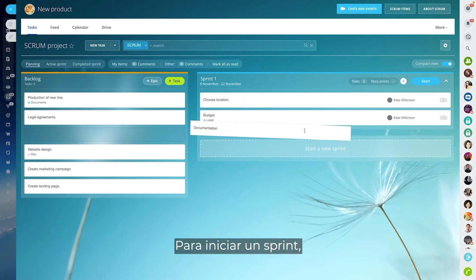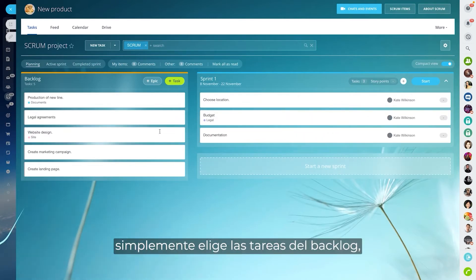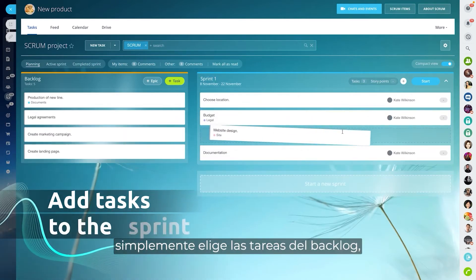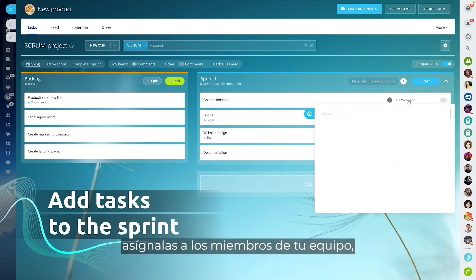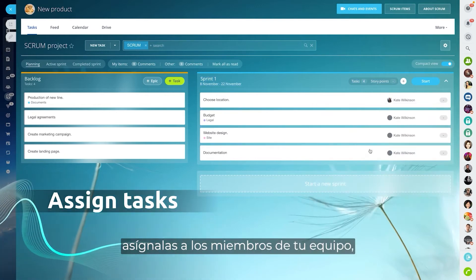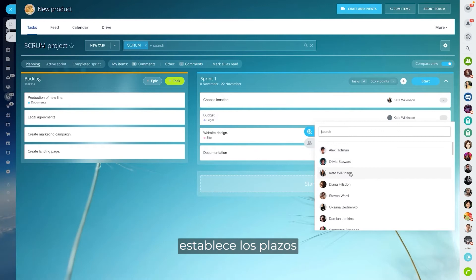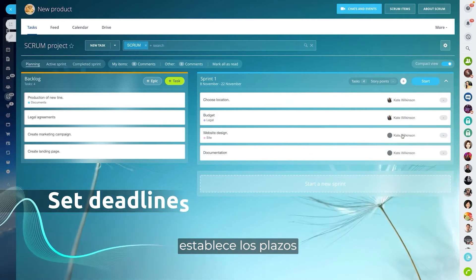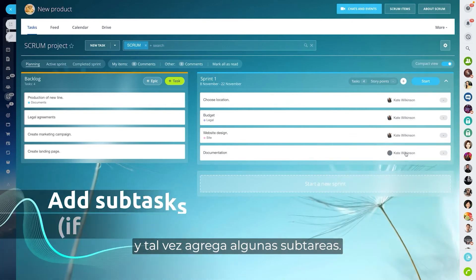To start a sprint, simply pick the tasks from the backlog, assign them to your team members, set the deadlines, and maybe add a few subtasks.